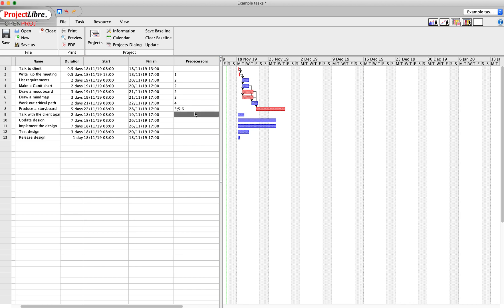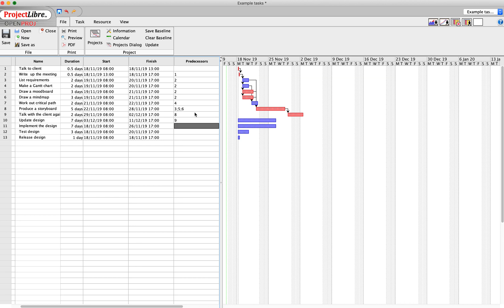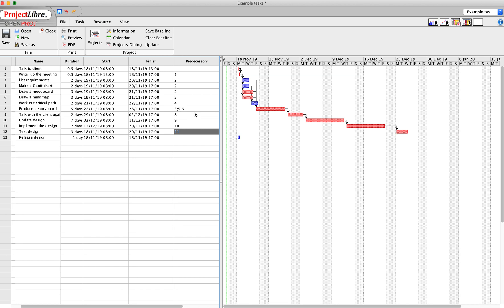Okay, talking with the client - we talk to the client after we finish our storyboard. Then having spoken to the client, we update our design. Having updated the design, we implement the design. Having implemented the design, we test the design. And having tested the design, we release the design.